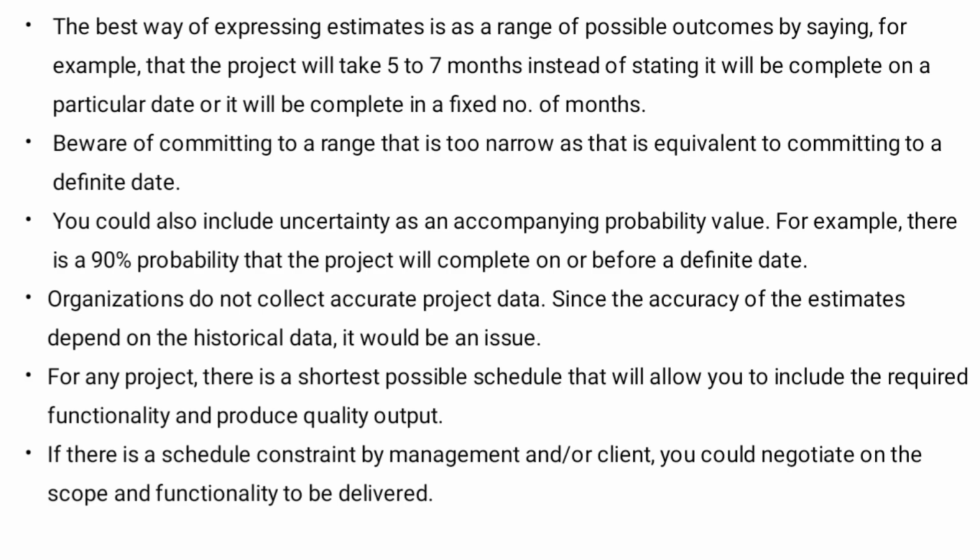Then beware of committing to a range that is too narrow, as that is equivalent to committing to a definite date. You could also include uncertainty as an accompanying probability value. Organizations do not collect accurate project data, and since the accuracy of the estimates depends on the historical data, that would be an issue.